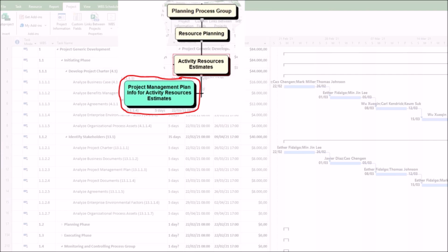First, unrealistic expectations if stakeholders receive a resource plan that is doomed to failure. Second, project delays, which are the most common result. Resources are not available when needed, causing sequential delays. Third, budget overruns if you are forced to pay premium rates for last-minute resources, rush deliveries, or overtime.